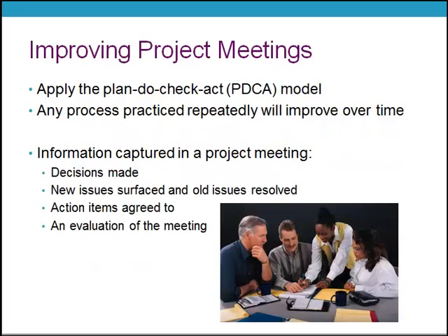I'm not going to say a lot on project meetings. I will say that the plan, do, check, act, otherwise known as PDCA, process is a good one to follow. For example, as a project manager, you should plan, that is, prepare and disseminate the agenda ahead of time. Do, conduct the meeting, ensure that no one participant dominates and that quiet members are encouraged to participate.